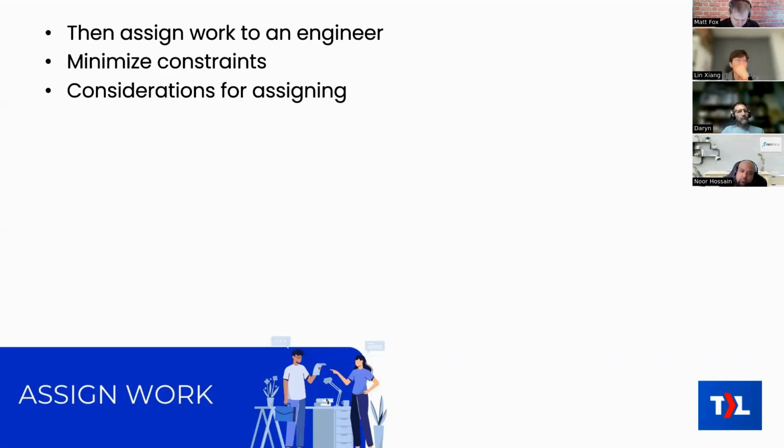Now, by the way, for the task of assigning tickets to an engineer, everything I mentioned last week about your different dispatch methods, like the team queue or the individual technician queue, all of that same stuff applies. So an ideal dispatch method would be to not even actually dispatch them, just to have a single queue of tickets where the project manager orders the tickets. It could be a couple tickets from one project, a couple tickets from another project. Basically, they just order those tickets one by one in terms of their importance to the team as a whole. And then you don't even assign them. Engineers just take from the top whenever they're ready for new work. That's kind of the ideal way to do it. I talked about that last week in the service stuff, and that still applies here. That is possible. Or maybe you assign it to a certain tier, even if you have multiple tiers within your project engineer team.